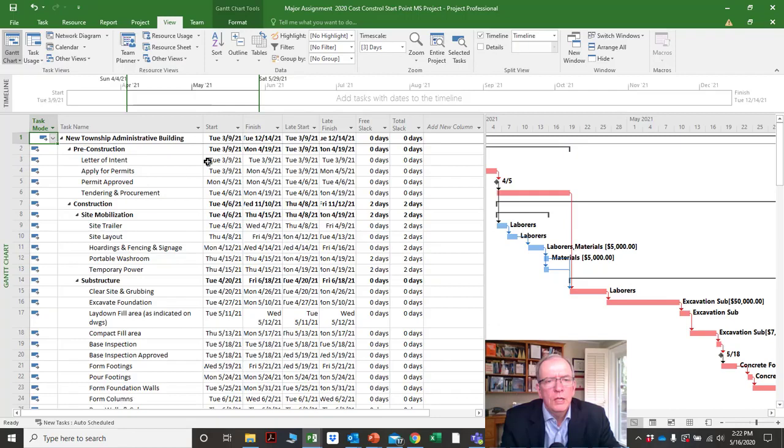So usually if you're just learning how scheduling software works, this can be quite useful because this has what we call the start and finish, also known from critical path terminology as the early start and early finish, and late start and late finish. And so to calculate the critical path, there's an algorithm, and there's what we call a forward pass and a backward pass. And you can do this manually.